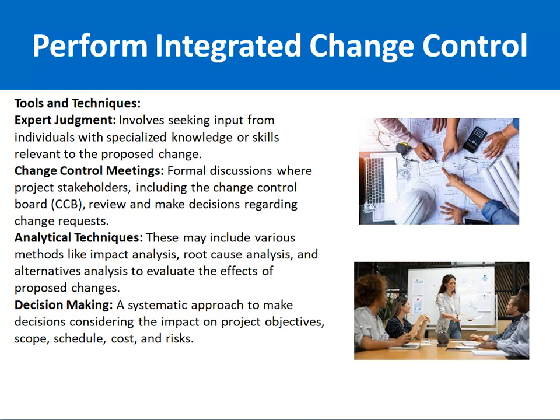Then analytical techniques. Other analytical techniques which we can use are impact analysis, root cause analysis, and alternative analysis to evaluate the effect of the proposed changes. Like, if we make those changes, what is the impact on the project in terms of scope, cost, and operations? So all those factors are analyzed in this formal change control meeting.